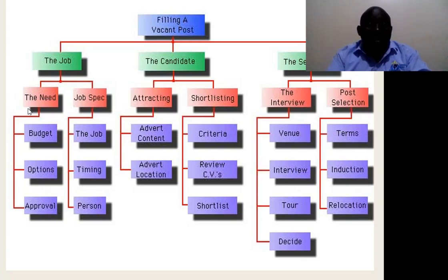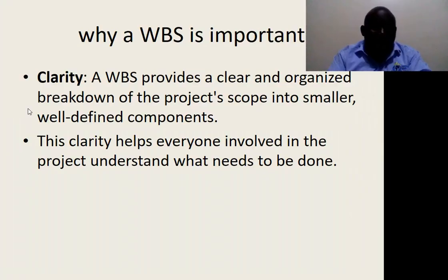You level the ground, dig the foundation, raise the walls, do the beams, the roofing, and put in the shutters. Then you begin to think about the electricity installation, the water installation, the interior, plastering, and many of those. As you do that kind of arrangement, you are looking at the work breakdown structure. I hope we are on the same page.